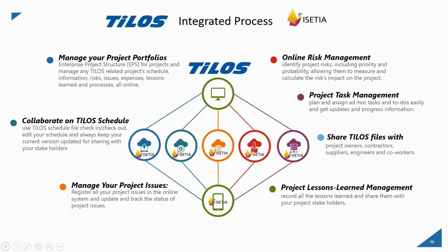We provide task management functionality. Everybody knows that with Tilos, our major focus is on civil works, planning and controlling civil works. But in a project, we have too many tasks which we cannot plan in Tilos, such as permissions, design, and procurements. These areas include ad hoc nodes, ad hoc activities. You can assign the people and follow up the tasks, so that in a Tilos project, the project which you plan in Tilos, you can also have an extra dimension for administration tasks. You can assign the people and follow the tasks online and on mobile.